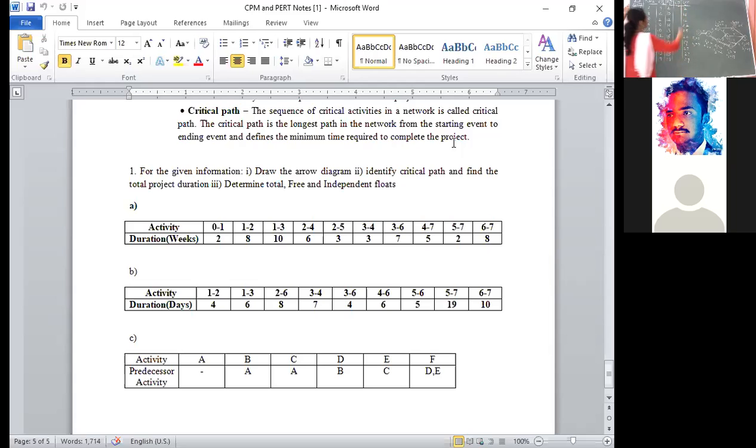Here LJ is 2 minus the time duration, which is nothing but TIJ. 2 minus 2, 0. 16 minus 8, 8. 12 minus 10, 2. 22 minus 6. Like that you have to write down, students, okay?